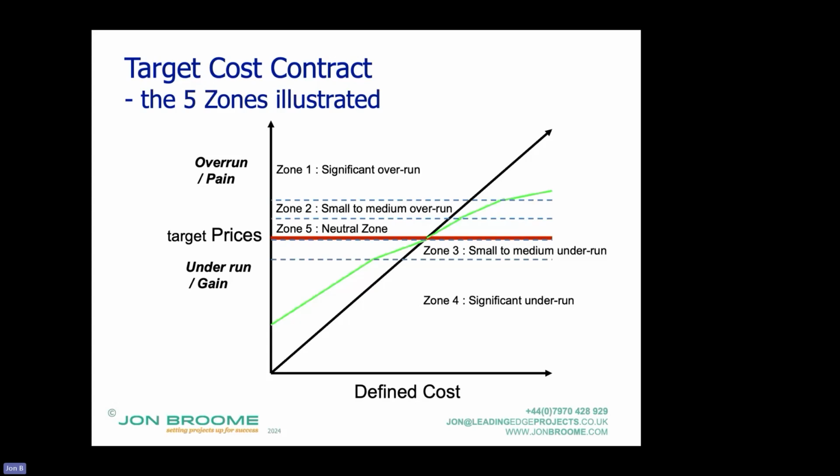So in that zone it will be at cost. You'll look slightly worse, profit on turnover wise, but in absolute terms, you're going to make the same profit. So that's a negotiator's ploy when you can't quite close the gap in terms of figures in a negotiated or open book environment.